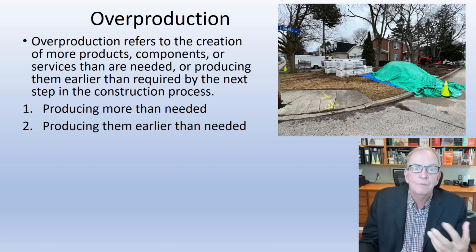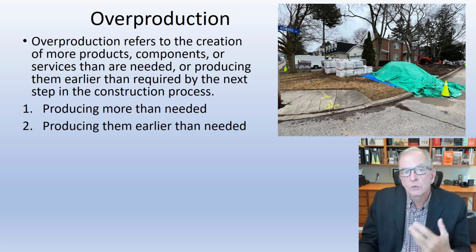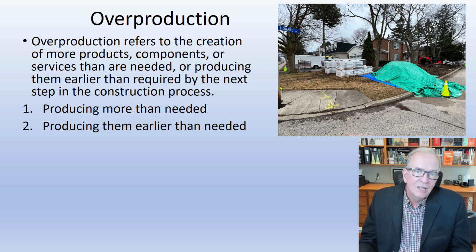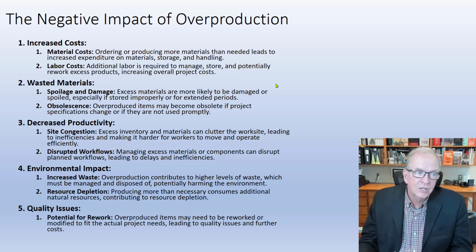If you have way more than you need and it's going to sit there for a longer time, you're exposing yourself to additional risk. So there's the time of moving it, there's the potential for it to be stolen, and it's really in your way. That's a disruption in your labor costs because now it's moving around back and forth, that sort of thing. Just giving you a little sense of overproduction. You can expand this, just look around your construction project and you'll see it.